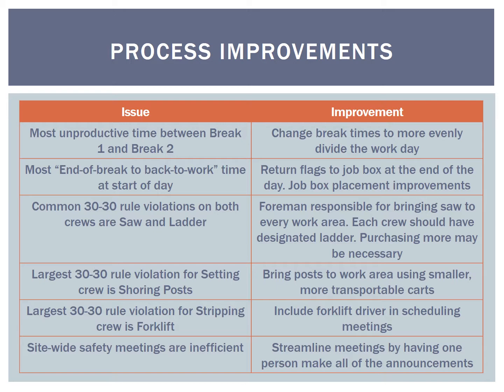This could be minimized by always ensuring the flags are returned to the box at the end of the day and improving the job box placement. Saws and ladders were the only two items above 80% for both crews, so another suggestion is to better manage or purchase more of these tools.